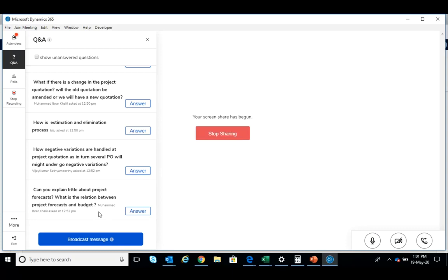For example, for the company as a whole, if you want to know the total budget of expenses for, let us say, 5 projects. Let's say there is a company A doing 5 projects, and the total cost to be incurred for all the 5 projects together is 10 million. The only place where you can see this 10 million total cost of all project budgets combined is in the forecast. So forecast can cut across all the projects, all the project budgets, project files. So the company can plan a cash flow based on the forecast.